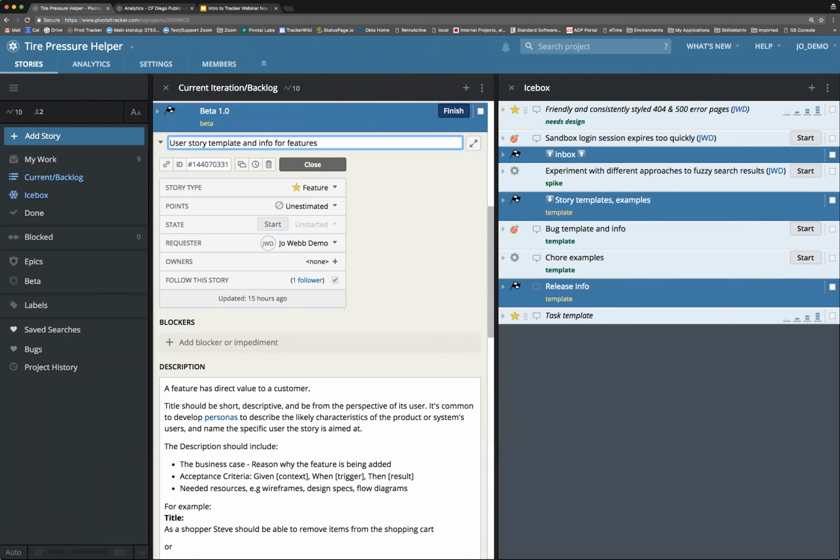So the team discusses this, and they're going to come up with an estimate about how long or how difficult it is to complete a particular story. Some teams do start off by equating points to time. We find that doesn't work so well. What works much better with stories is to think of them in terms of size or complexity or difficulty.